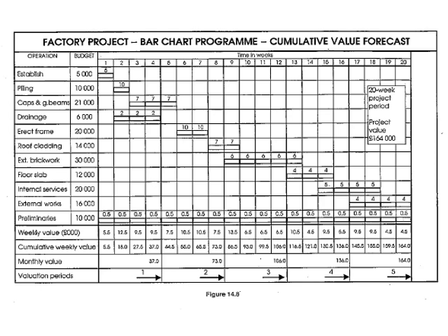cumulative forecast, and this is something that you guys will have to be able to do. So you should be able to actually go and plot this. It's very easy. You've got your program here on the left, and then you've got your time in weeks or months, or whatever expenditure or weight that you do allocate to it. And very simply, you just allocate your expenditure.